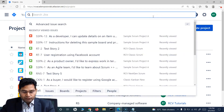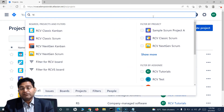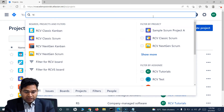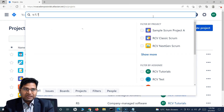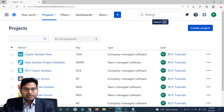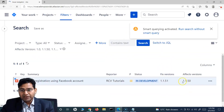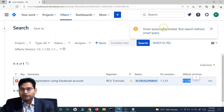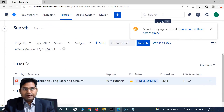To search by affects version in the quick search, type 'v' followed by a colon and then specify the version you are looking for. For example, if I type 'v:1.*' using the wildcard star, and hit enter, it will filter all issues that have an affects version starting with '1.'. If I type 'v:1.1.50' and enter, you will see that specific issue pulled up.